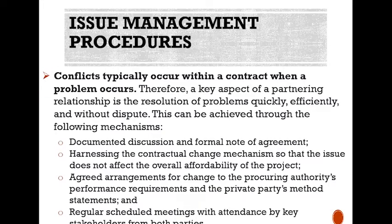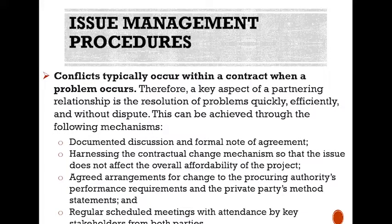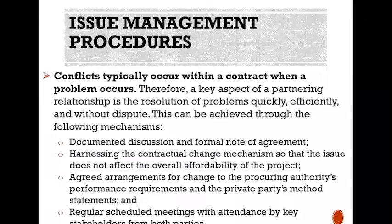Issues management procedures. Conflicts typically occur within a contract when a problem occurs. Therefore, a key aspect of a partnering relationship is resolution of problems quickly, efficiently, and without disputes. Conflicts can be resolved through the following mechanisms: documented discussion and formal notes of agreements; activating the contractual change mechanism so that the issue does not affect the overall affordability of the project; agreed arrangements for change to the procuring authority's performance requirements and the private party's method statements; and regular scheduled meetings with attendance by key stakeholders from both parties.